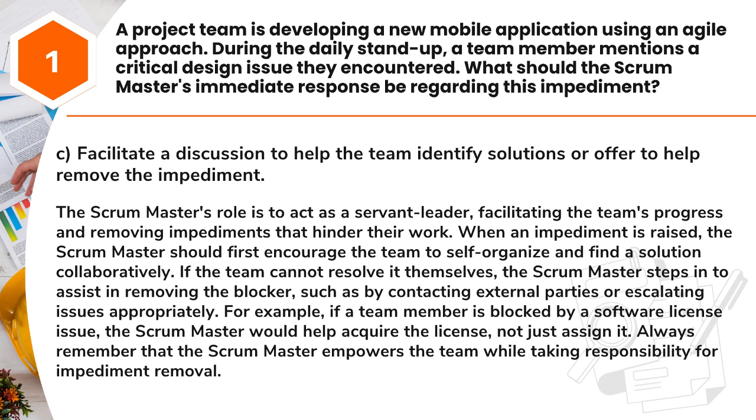For example, if a team member is blocked by a software license issue, the Scrum Master would help acquire the license, not just assign it. Always remember that the Scrum Master empowers the team while taking responsibility for impediment removal.